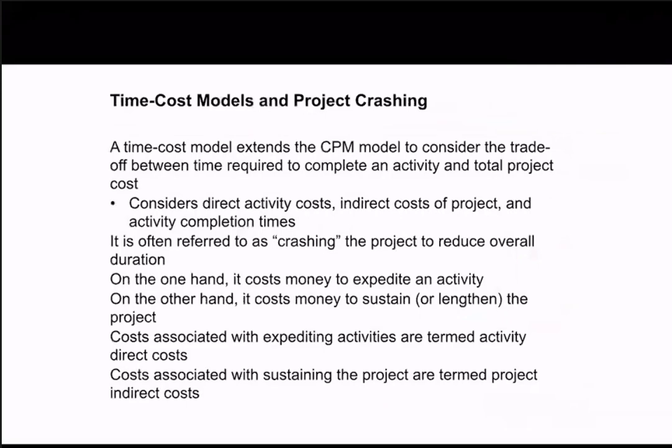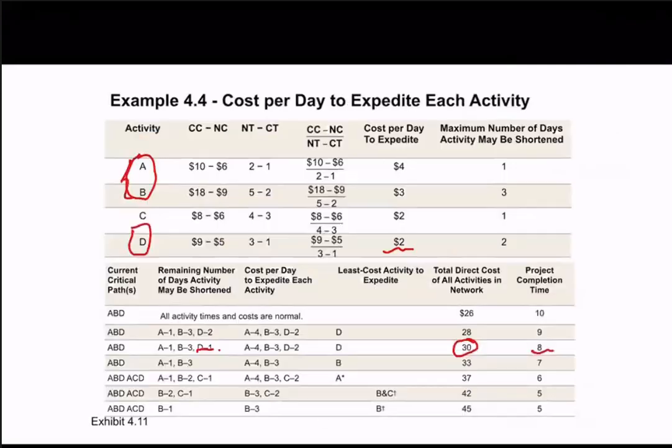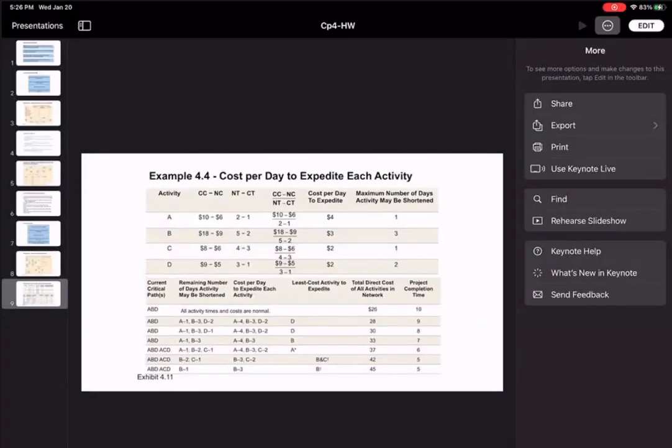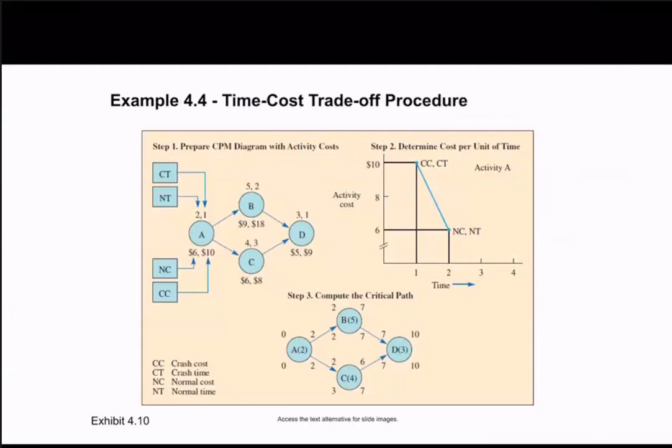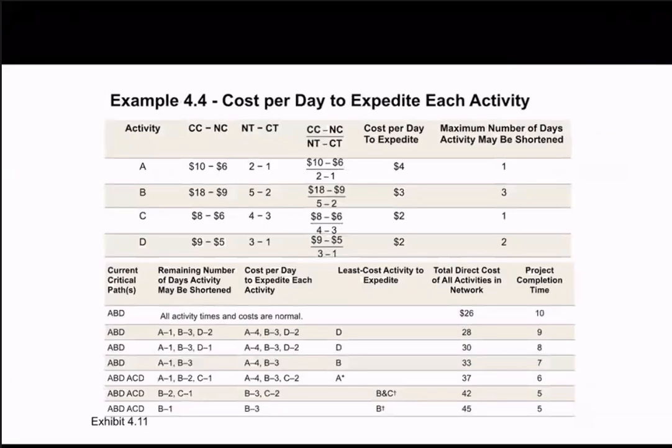If we have already reduced 2 days for the whole project, up to the third line here, the critical path is still ABD, because now ABD changes to 8, with B being 5 and D only 1 day, and 8 is not smaller than ACD, because ACD hasn't been changed. So we still have ABD as the critical path.